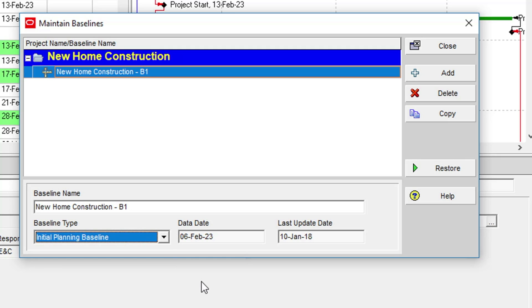The baseline we've just created is actually a full copy of the project in the database. It just doesn't show up as a project in the projects view of P6. However, certain items of its data can be seen within the current project once it has been assigned to it.